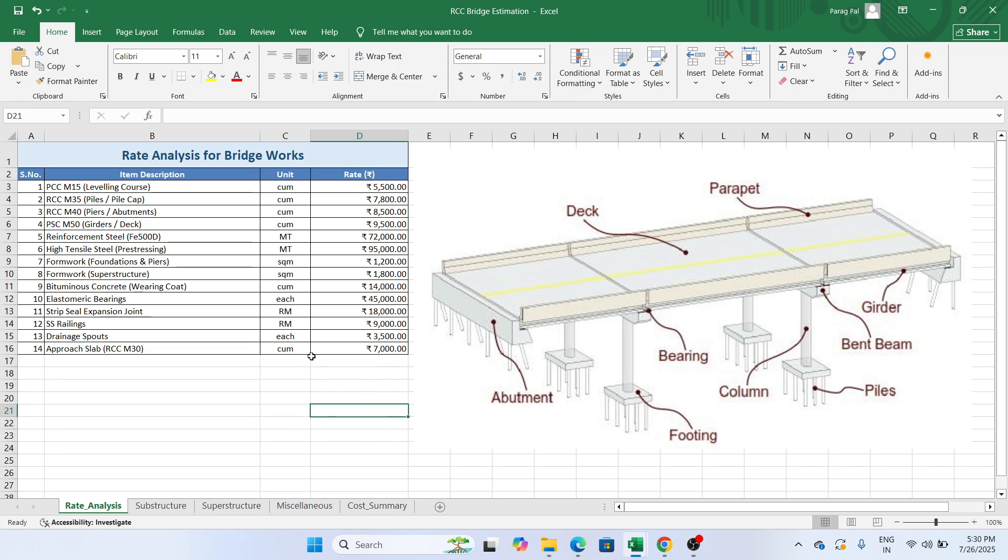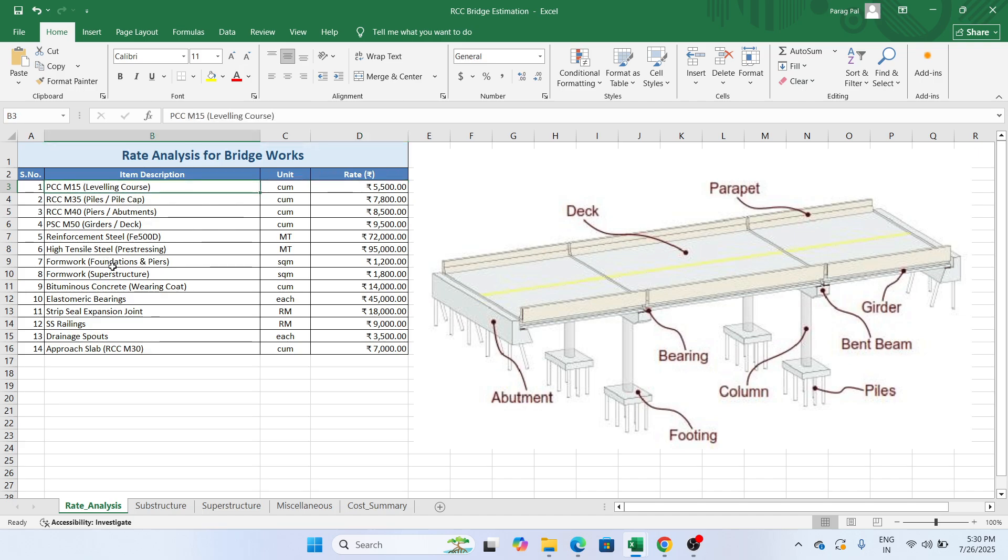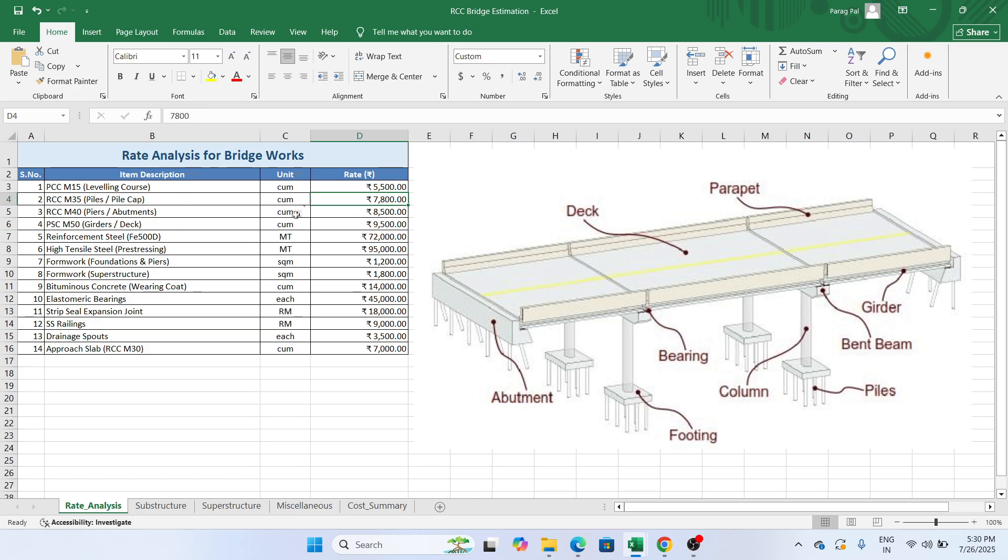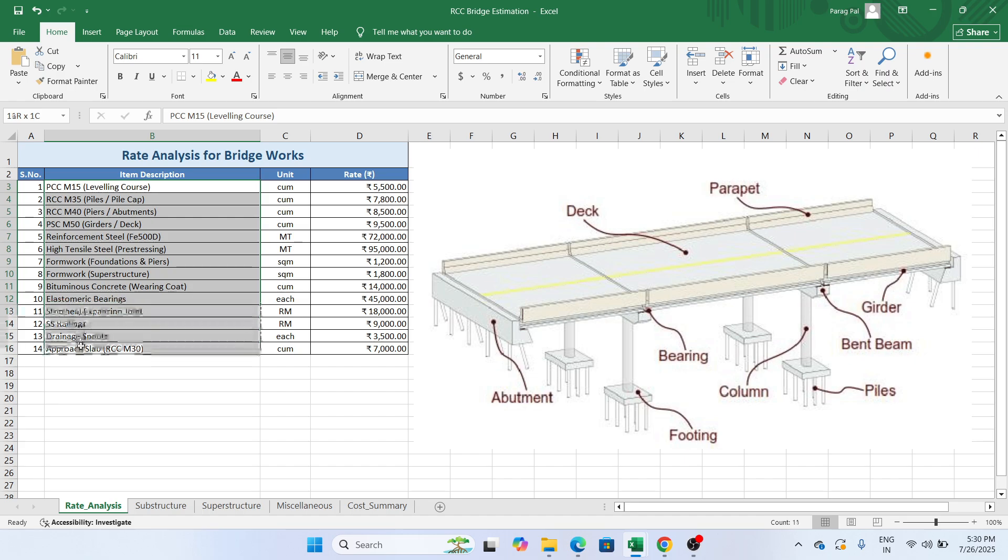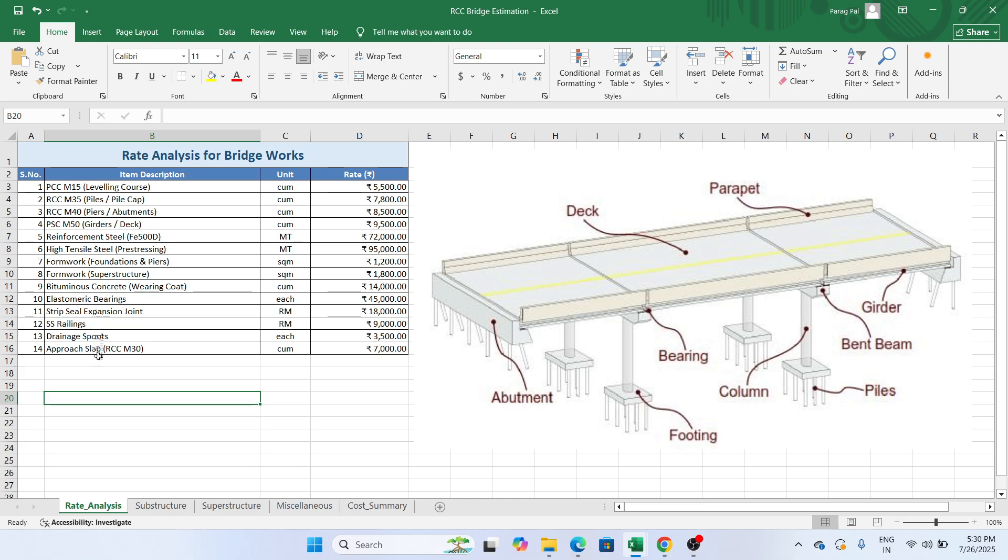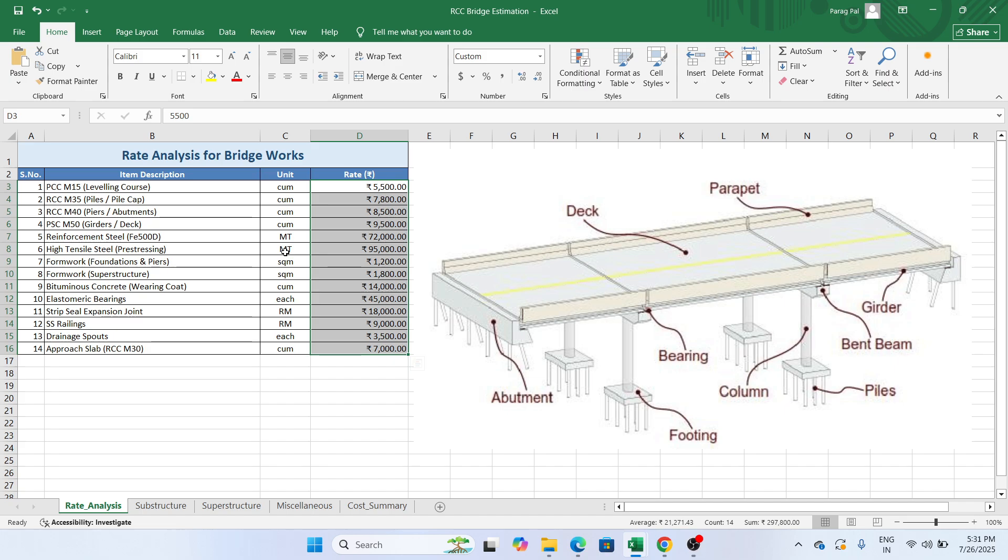Step one: in this file you need to add your rate analysis rate over here. This is the rate per one cubic meter quantity of the PCC M15, M15 grade of concrete. For RCC M35 for pile and pile cap I have this rate per cubic meter. For the reinforcement steel of FE 500D per metric ton I have 72,000. These are all the items that are required for the bridge from PCC to the approach slab. Rate analysis includes the rate of material and labor for one cubic meter unit or one metric ton quantity.